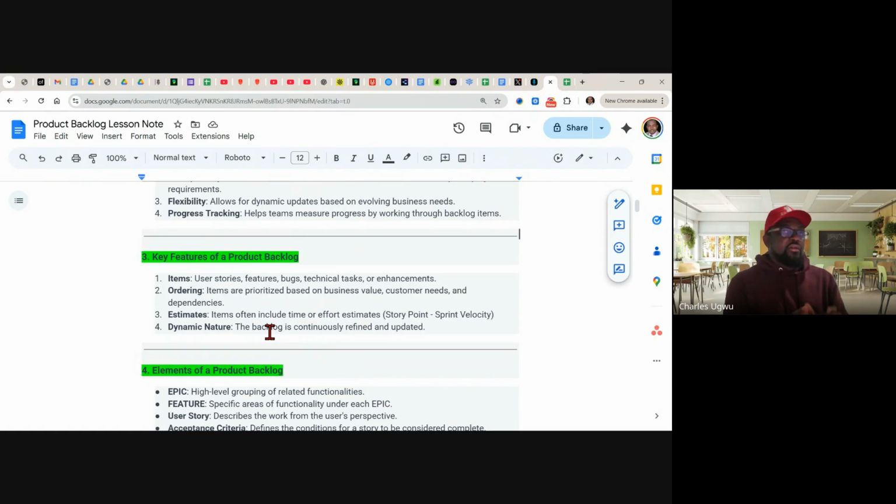So the developers can say, the way we do it is say within a scale of 1 to 10 or between the scale of 1 to 20, there is no standard scaling. It's the duty of the team to adopt whichever range that works for them. You can say between a scale of 1 to 100, give us your story point. You can say between a scale of 1 to 10, 1 being the easiest and 10 being the most complex, give us your story point on how to complete this work item.